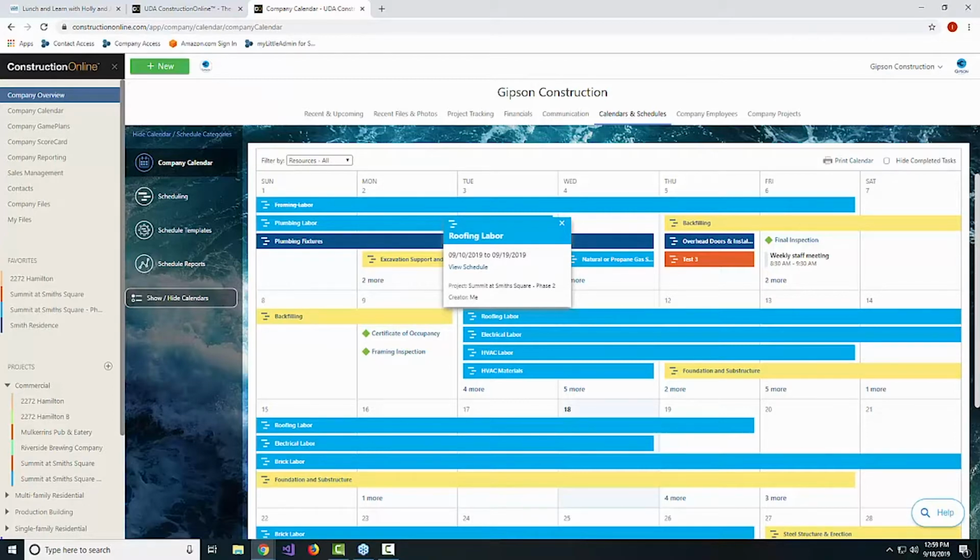And you've got two options. One is to have a project template that you're using, where you would just create a new project for each unit, but using the template system, you only build it once, and then that way when you're ready to do the next unit, you've got the steps outlined as far as what needs to be done, but one isn't necessarily dependent on the other.